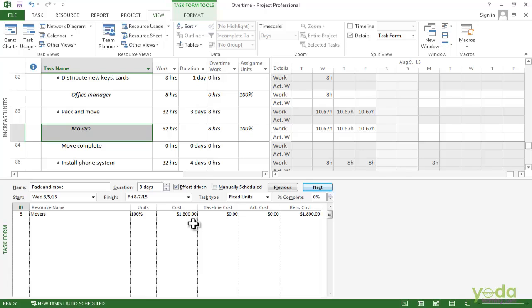If resources earn the same amount per hour, you can assign longer hours simply by increasing the units for an assignment. If you do need to use the project's overtime feature, a little setup makes it easy to designate overtime hours. I hope the concept is clear to you.